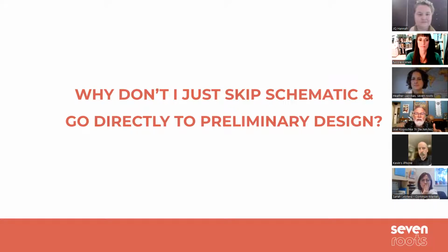And then as things get closer and closer, we think, all right, now we're getting close here. Now is when we add in all that detail. But if we had that detail earlier, and if we tried skipping schematic, then we'd be reworking things with all that extra detail. And that would take too much time and cost you too much money to do iterations in that mode.